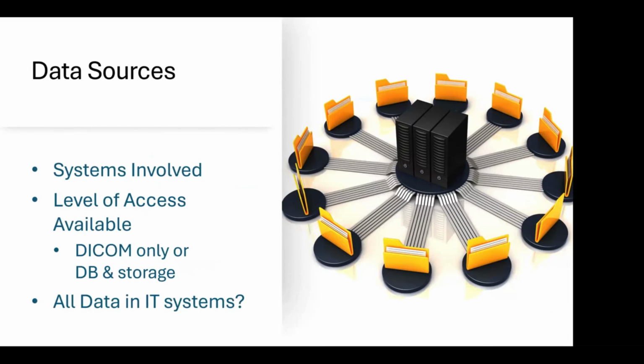So then when you look at the data sources, you have to understand the systems involved. So you have to have an inventory of all those things, including, ideally, things like what is the software version of that system, contacts of the staff, your internal staff who knows those systems, vendor contacts, like collect all of that stuff up, because as you go through the process, you may need to invoke expertise either internally on the legacy system to understand something, or even open tickets with the vendor or engage them.